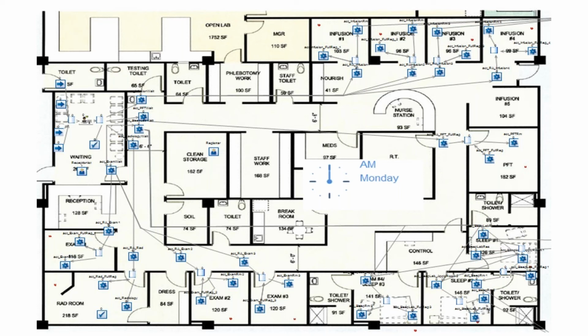The other thing in this model that we did is we built in revenue and cost. And so, taking advantage of the standard functionality that Simulate has for giving a standard revenue and cost to a work item, that way we could really test not only throughput, but also test the margins and test volumes. And okay, where's the break even where this project doesn't even make sense? So you need to have a certain amount of patient volume before you're covering your variable costs.